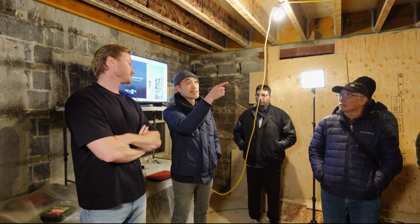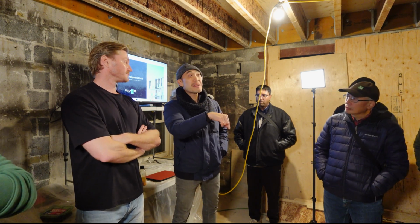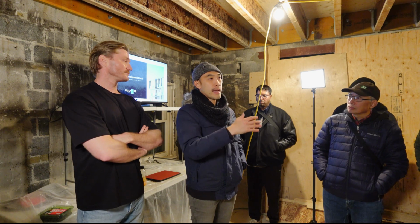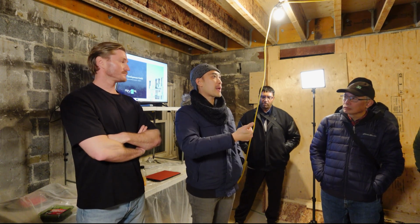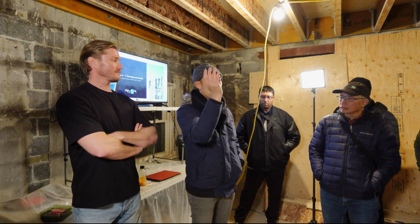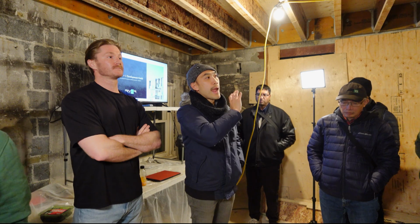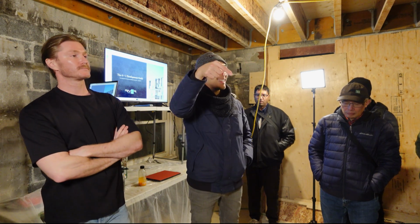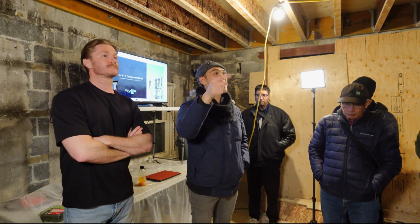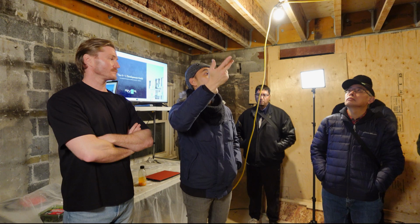So what's key? You said refinance. The difference is he got CMHC construction financing up front, which means there's no refinance on the back end. Let's just use traditional financing as an example. You can go through an entire project. You put your down payment down, get a normal mortgage, get construction financing after you get your permits and approvals. For construction financing, you have to put down another 20, 25%, whatever. Then you take it in draws, you reach the end of the project, and then you refinance, right? And then you're subject to the actuals in terms of the economic climate, what you actually got in rent, actual building valuation at that point in time, et cetera.